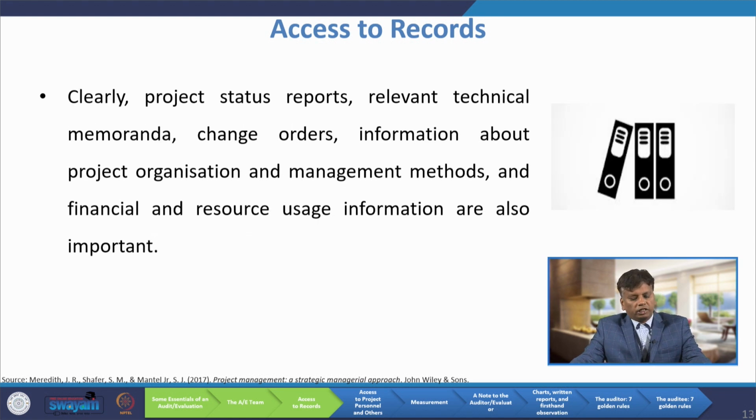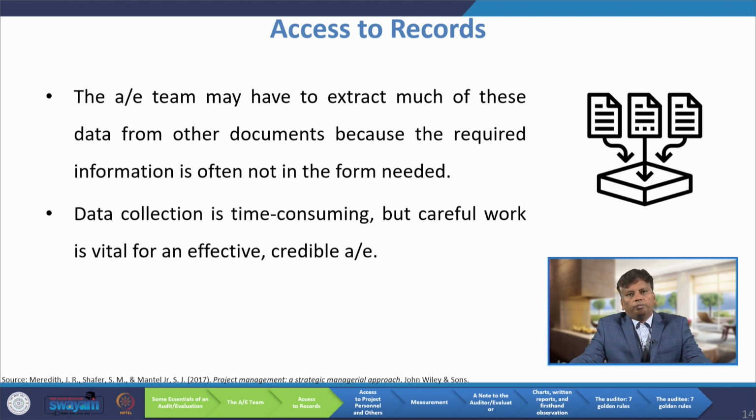Clearly, the project status report, relevant technical memoranda, change orders, information about the project organization and the management methods, and financial and resource usage information are also important. So, the audit team may have to extract much of this data from other documents because the required information is often not in the form needed. So, data collection is time consuming, but careful work is vital for an effective and credible audit.